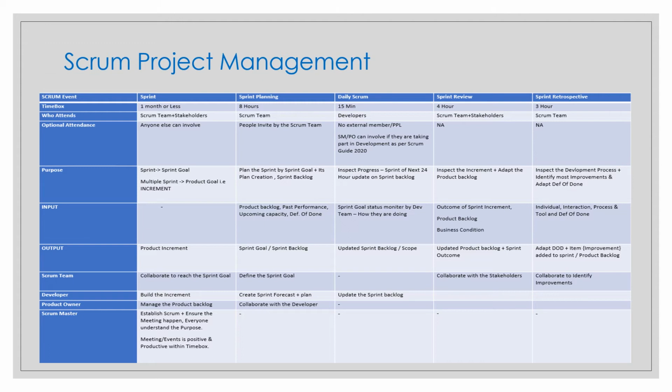Usually in daily practice, a 1 or 2 week sprint works best, and most commonly sprints tend to be 2 or 3 weeks long only. Especially if you're working on a software product, the duration of a sprint should not be decided by the organization. Scrum does not explicitly mention who decides it. It will be a self-managing team. The Scrum team is going to decide, and they need to figure this out depending on various factors. The Scrum team, in collaboration with the stakeholders and the organization, may decide the sprint duration and align it with the internal events.